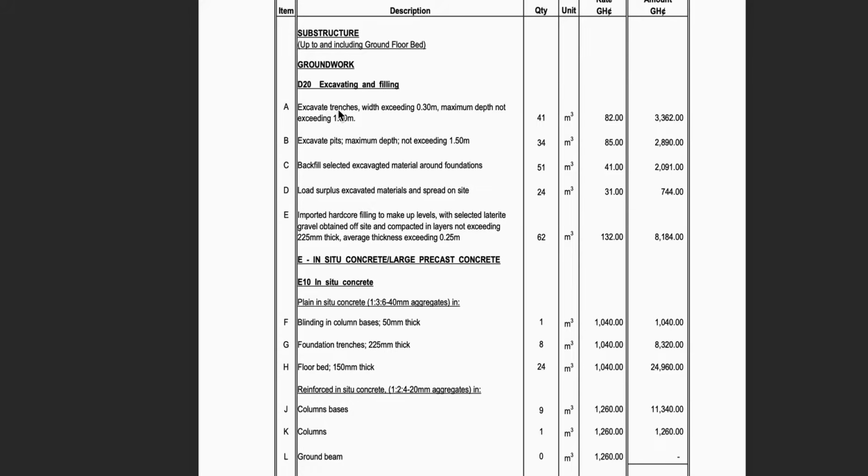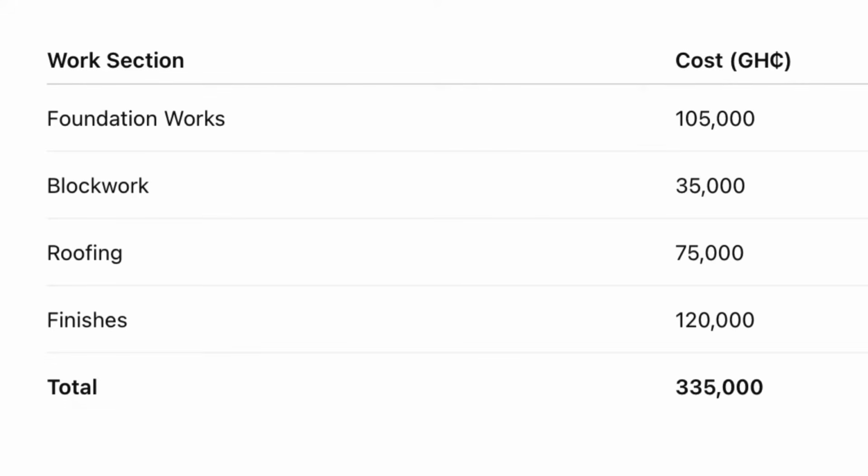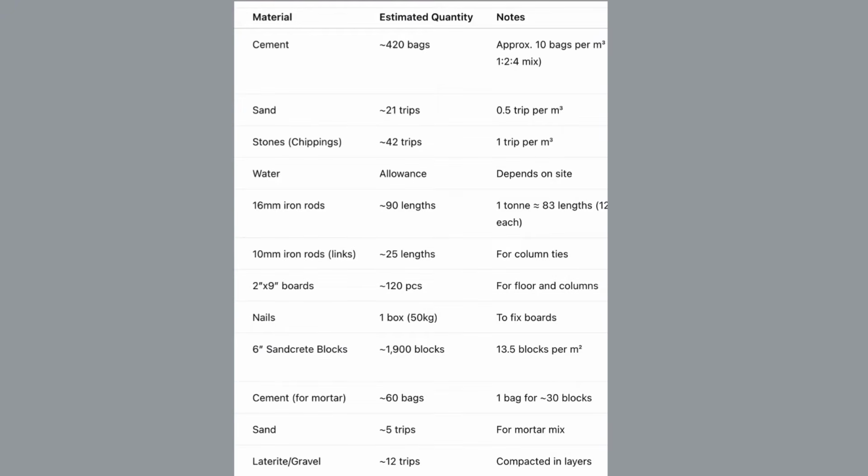There is the standard bill of quantities, which is very detailed. It's done by a quantity surveyor and the transparency is really high. The other types are simplified contractor quotes, which can be very brief and suitable for small scale contractors. Sometimes the transparency is a little bit low and it is less contractually binding because it's not based on exact numbers. There are also the trade based or material based ones. There are the activity based ones.